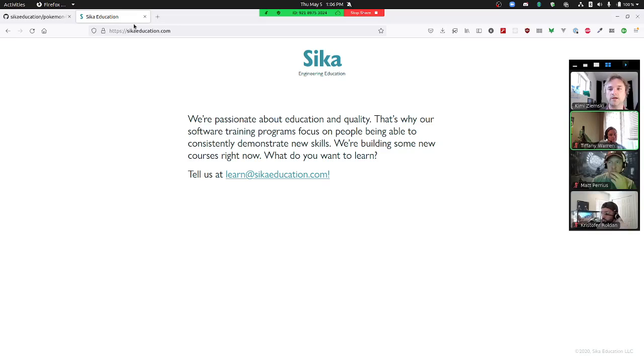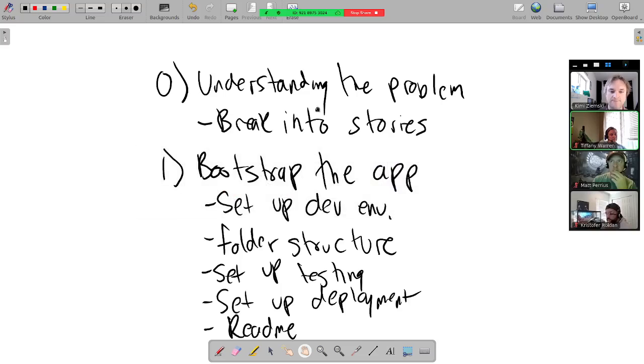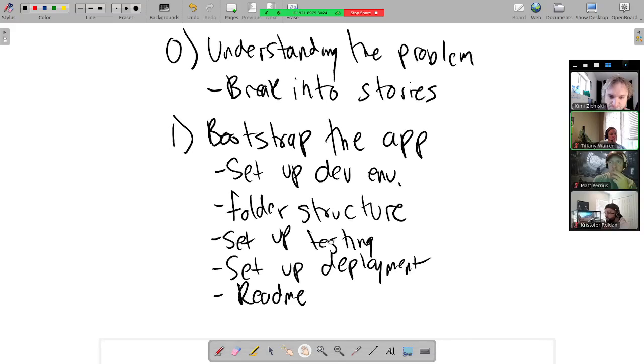Now, the thing that's kind of hidden in that is, to get this far, I had to set up deployment. I had to set up the files. I had to get my dev environment going. I had to do a lot of these kinds of chore sorts of things. I did not have to do all that much software development. So that gave me an opportunity to split out some of those tasks while still doing something that somebody would reasonably find valuable.